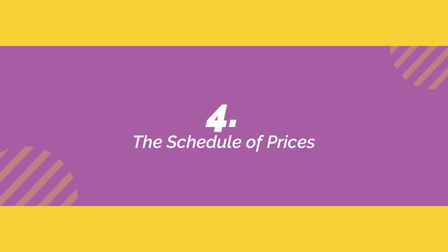The last step is a schedule of prices as an alternative to specification. In the case of without quantities contracts, bidders may be supplied with a schedule of works. In this schedule, we have to insert the works of the contract under the appropriate headings. The bidders may need to price this schedule.